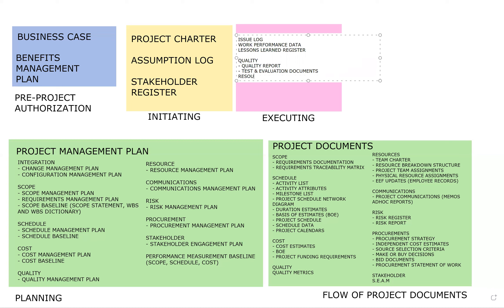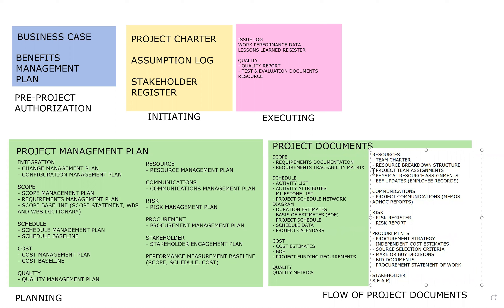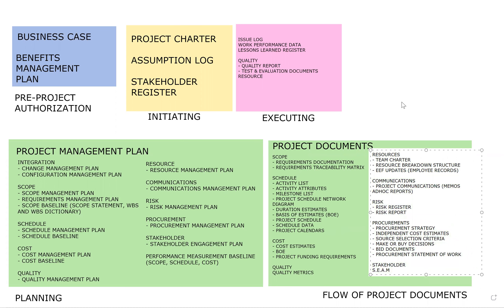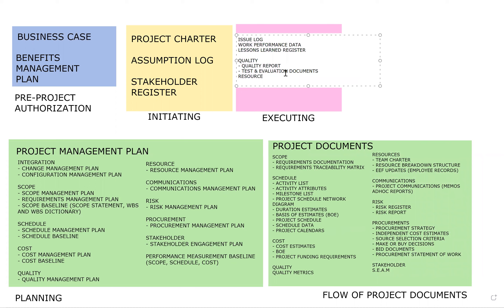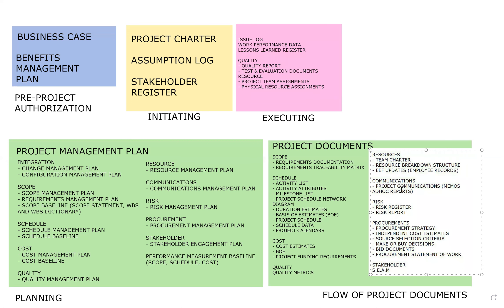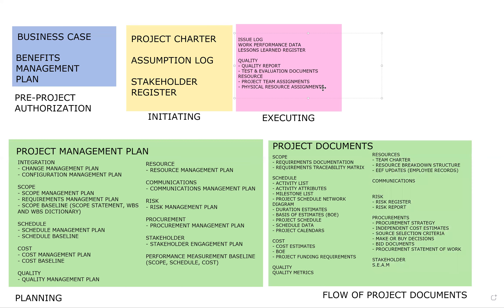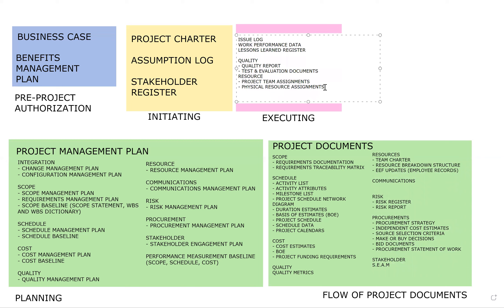Getting into resources in executing — project team assignments and physical resource assignments actually belong here in executing, not planning, because assigning resources is an executing activity. Similarly, for communications, project communications — memos and ad hoc reports — are more correctly placed in executing rather than planning.